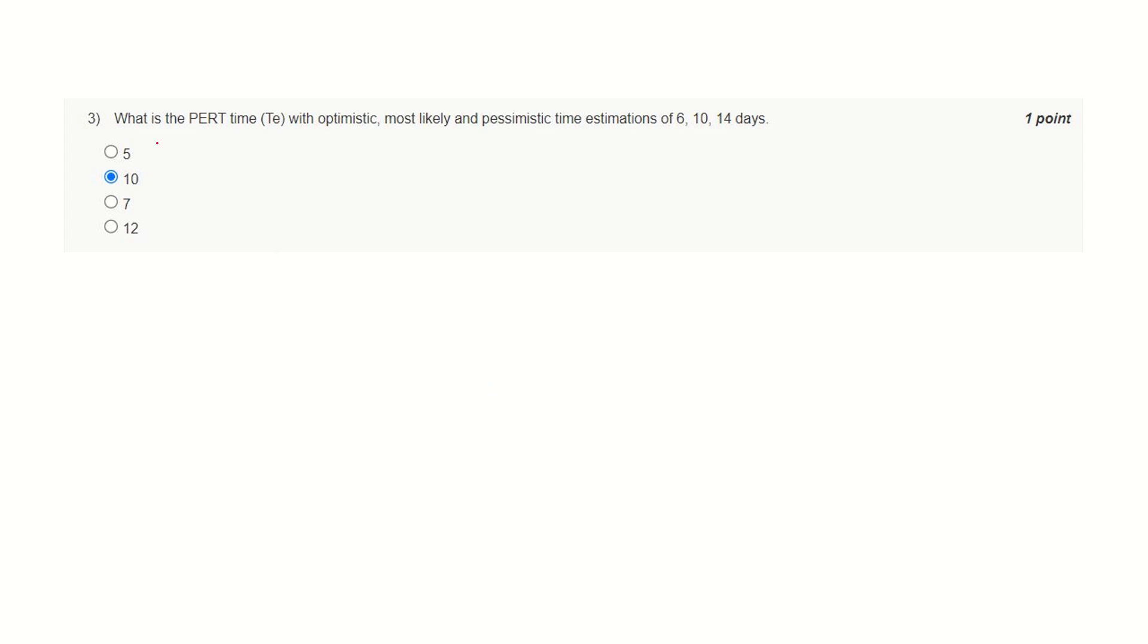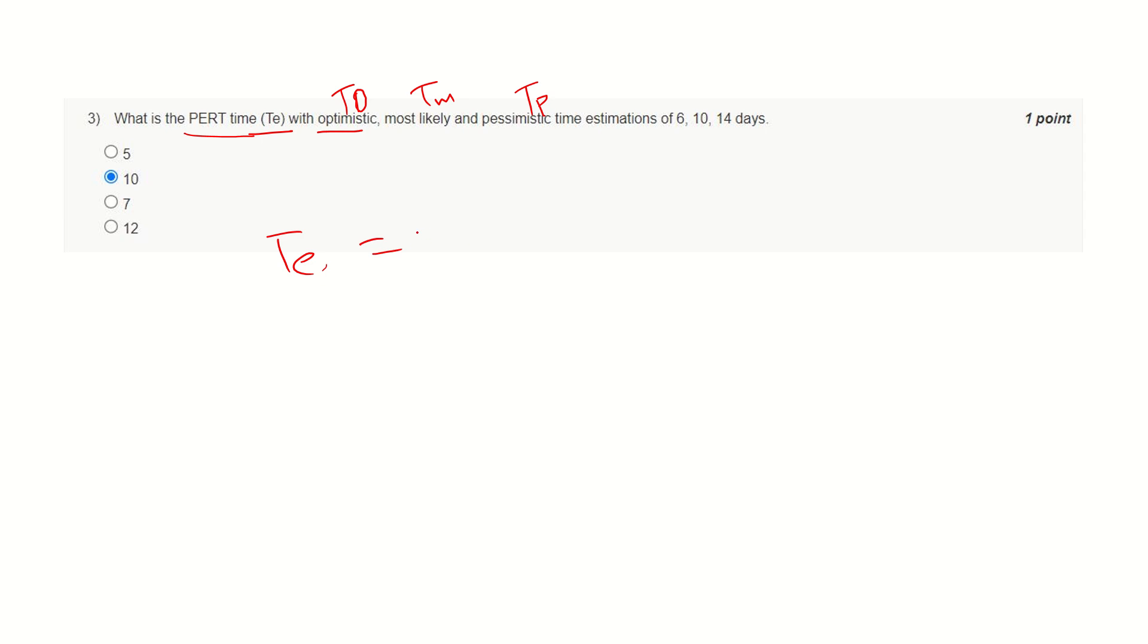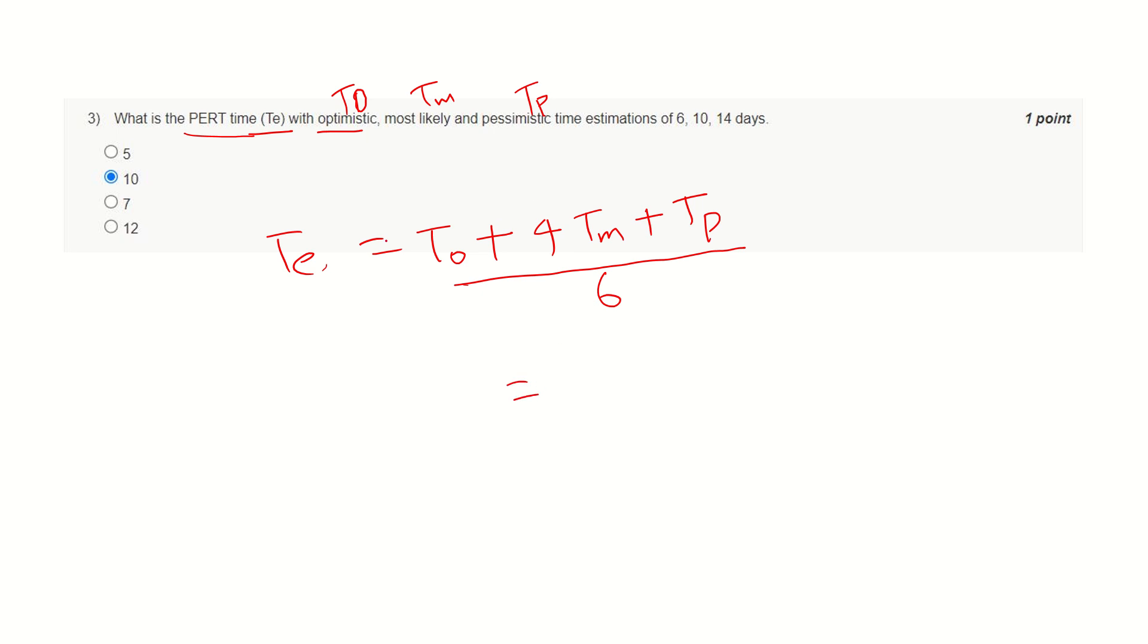What is the PERT time with optimistic—let's denote it with TO for optimistic, TM for most likely, and TP for pessimistic time. The relationship is TE equals TO (optimistic time) plus 4 times most likely time plus pessimistic time divided by 6.